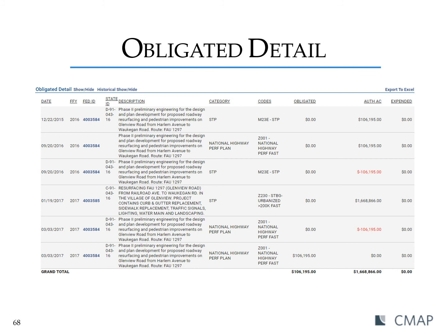And this is also a good example of when the calendar year isn't the same as the FFY. So here it is in 2015, but it's actually federal fiscal year 2016. Then we see in September of 2016, the fund source for the AC authorization was changed from STP to NHPP. So we see that those NHPP funds were added and the STP funds were removed.